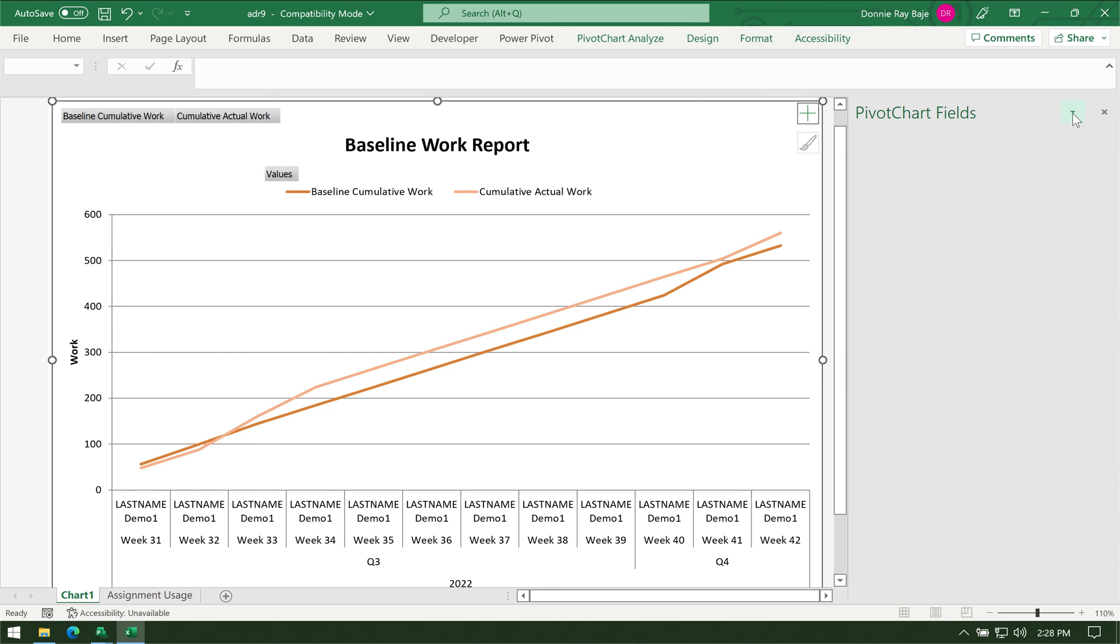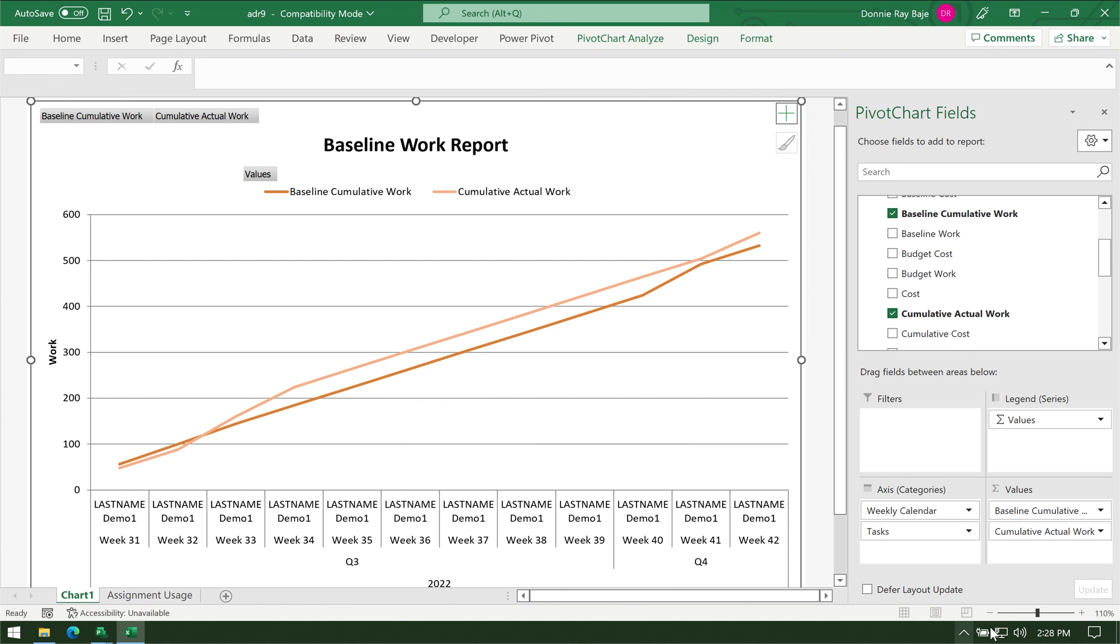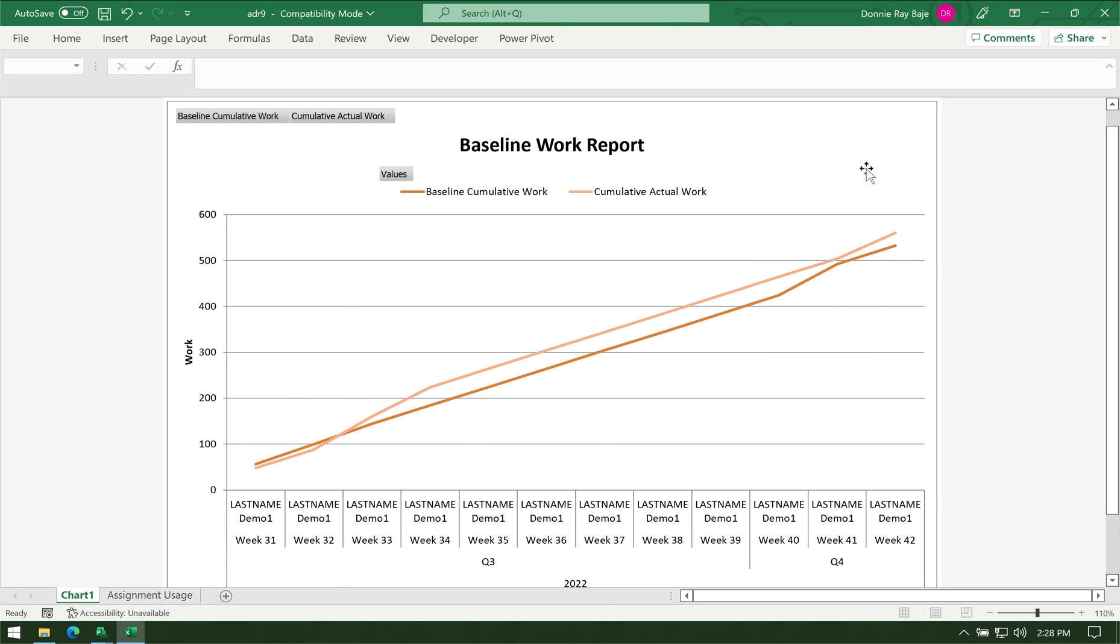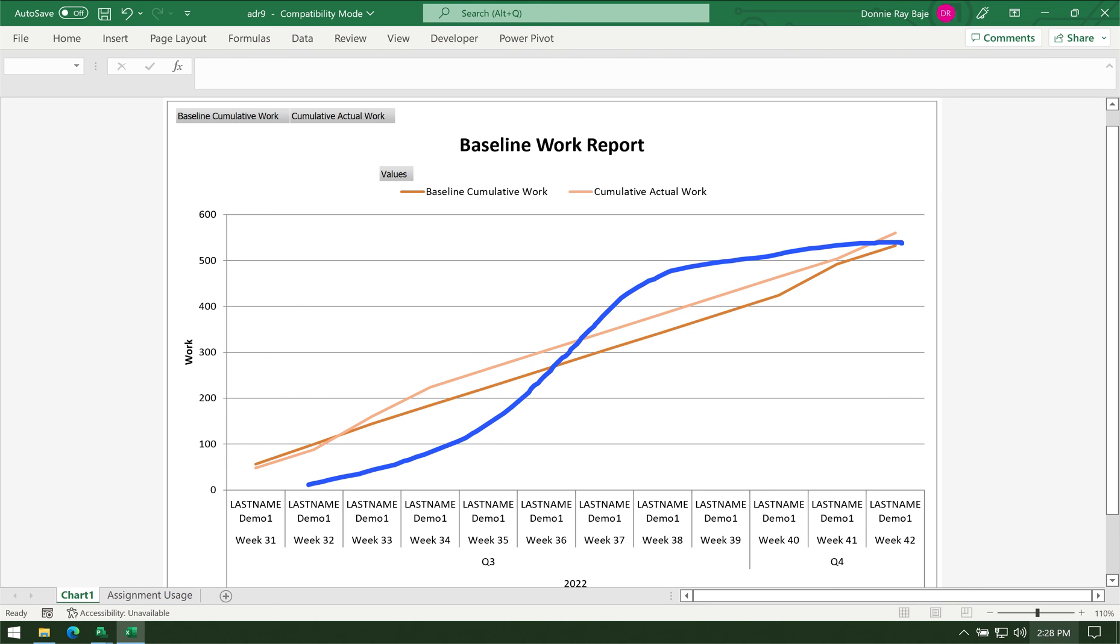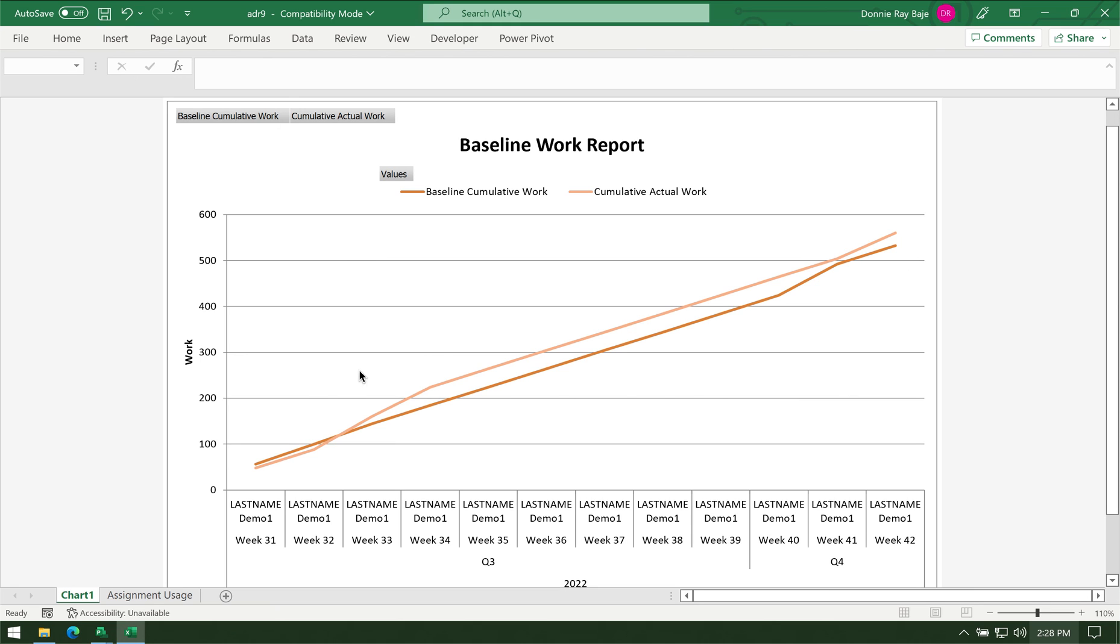If you have been doing S-curves for quite some time, you know that S-curves may not always look like an S like what we hope it to be. It simply means that the project is sort of like evenly distributed. There's no slow start and a plateau at the end. This one is a well-distributed S-curve, I think.